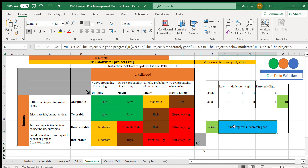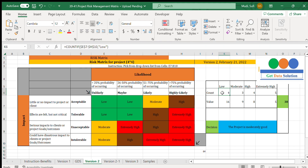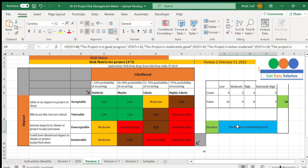Currently we have 38 as the total aggregate value, and the decision is that the project is moderately good. In this case we have 4 low cases, 3 moderate cases, 4 high cases, and 5 extremely high cases. Even though we have 5 extremely high cases, the project is moderately good, so we cannot reject the project without further decision-making.